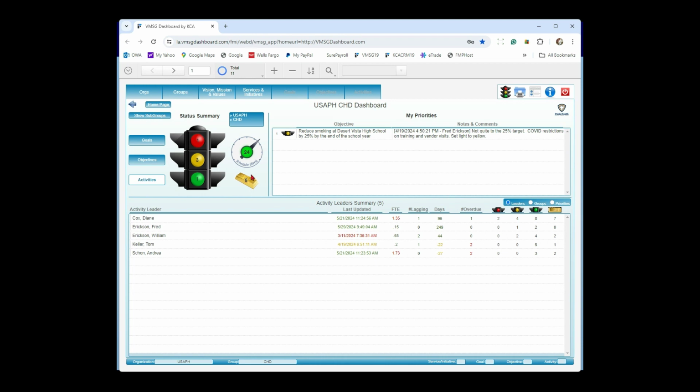So some are negative numbers, some are positive numbers. In this case, we're saying overall, we're 24 days ahead of schedule. So that's where that number comes from. And again, you could drill down on some of these and see that they're behind schedule, and some of them are way ahead of schedule, but in aggregate, you're 24 days ahead. So that's the first place to look.